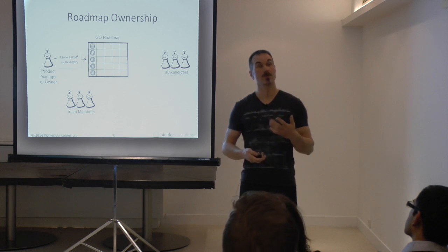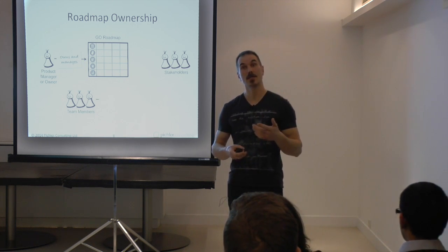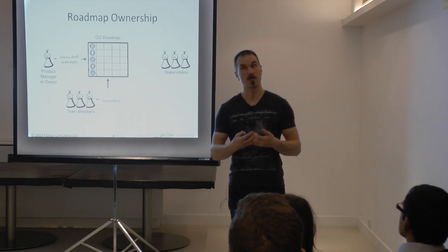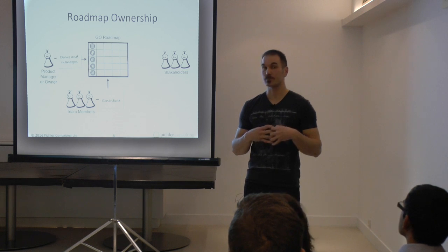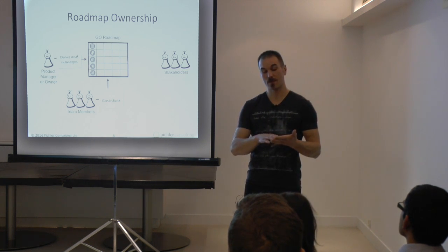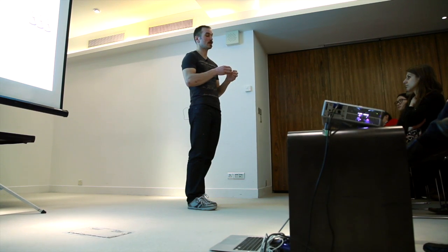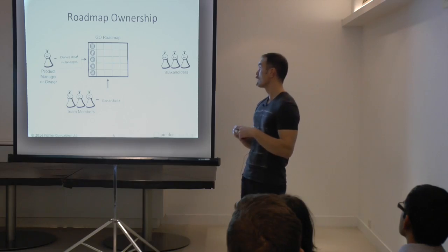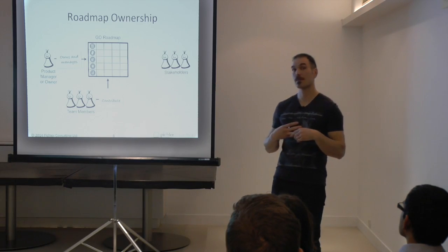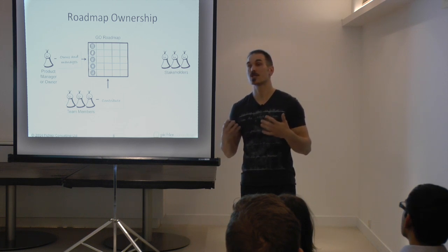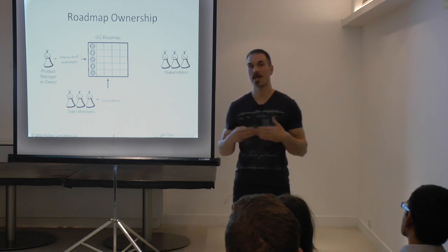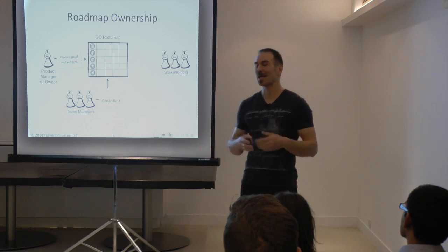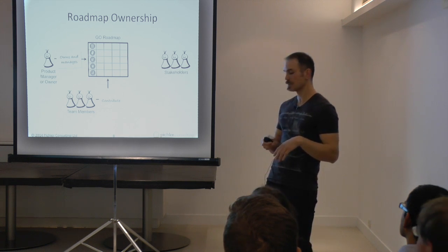But I would also suggest that you invite the team members to contribute to the roadmap and use the creativity and the knowledge of the development team. That has many benefits. One of them is that it helps you address and make technical risks more transparent at an early stage. So leverage the knowledge of the team members. It also means that there's shared ownership, that it's not only your roadmap, where you say, hey, it's great, let's do this now, and people just have to accept it. You invite people to contribute. That usually is a great way to build consensus.